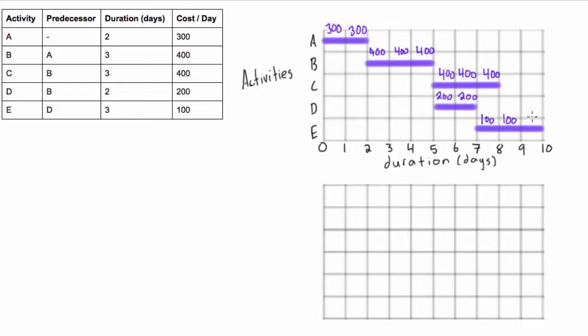So we'll go in and write that. So that's how much money it's costing us each day for the various activities. Now what we want to do with this information is we want to basically put it on a histogram. So we'll use the space down here.